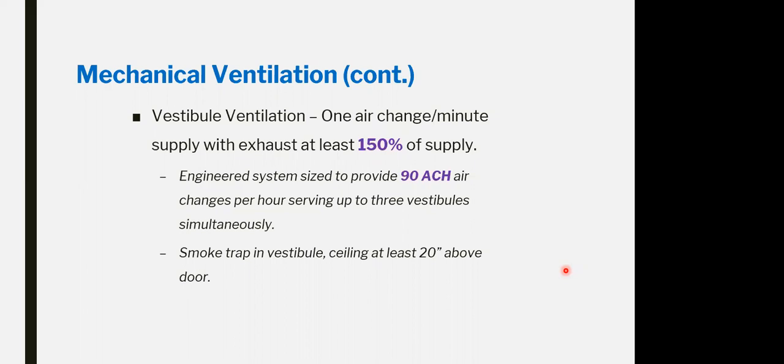Another difficulty we are facing during the inspection is maintaining the 50 Pascal inside the shaft with a full close. The maximum force to open the door is 30 Pascal. So they are coming and testing, and you have to provide a force bar to test and open the door. Not only this one, the panic bar itself of the door has to be tested with 15 Pascal. So this stair pressure test is the most difficult test during the civil inspection.